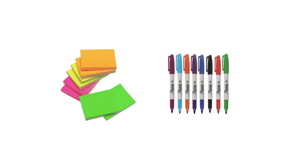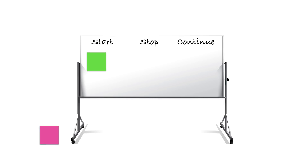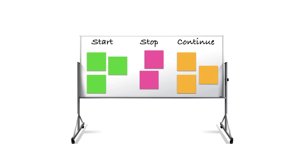So it's up to the Scrum team to choose its own method, or indeed to pick and mix from a number of different methods. One common approach is the Start, Stop, Continue method. Each member of the team grabs some Post-its and a Sharpie, and jots down thoughts from the current Sprint under the headings of things the team should start to do, stop doing, and continue to do. They do this individually at first, before moving the Post-its onto a whiteboard to talk through each item, identify common themes, and come up with some action items.